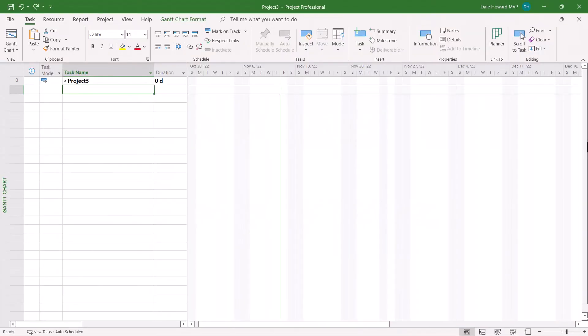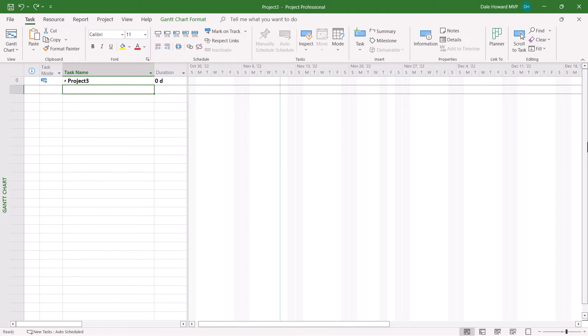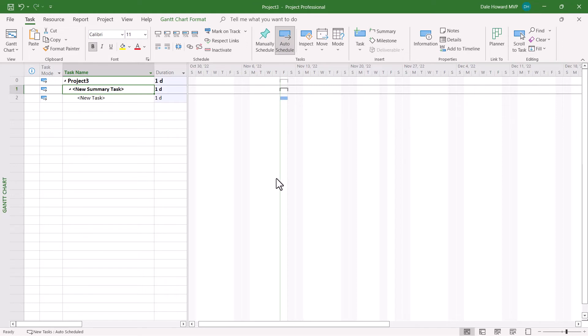As a bonus, I'd like to show you how to use that Insert Summary Task button to create summary tasks that represent the deliverables in your project. So begin the process with a blank project and then click the Insert Summary Task button. Give the name of the first deliverable to this new summary task.